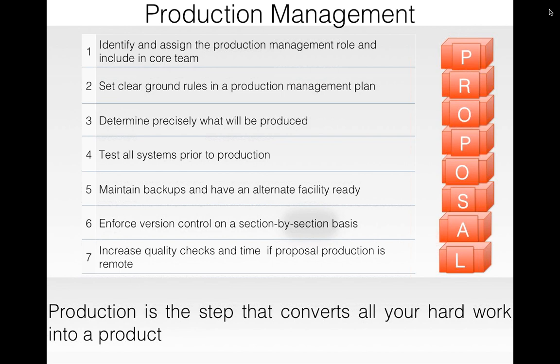Another big problem which happens when you have multiple people writing the content is a mix up of the versions of the content. The writers may submit and somebody else is assembling the entire proposal, and there is always a chance of missing some new content coming in and letting the older content remain there. And these sort of issues should be managed very effectively by using version control.